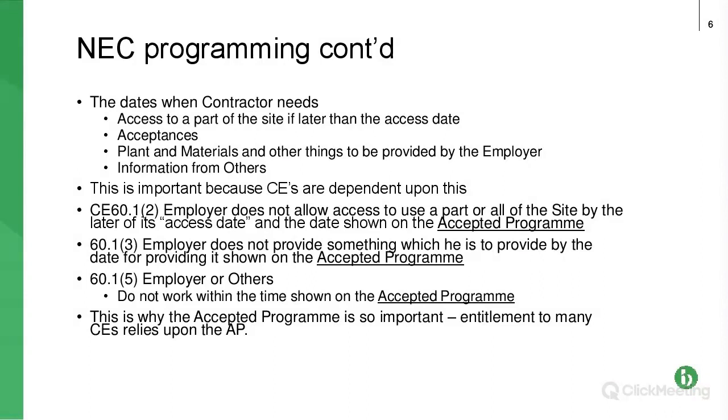And this all makes sense because if it's in the programme, the contractor or a subcontractor has prepared the programme, so hopefully is going to comply with it, but also it means that the project manager knows when it has to provide acceptances for access dates, etc.